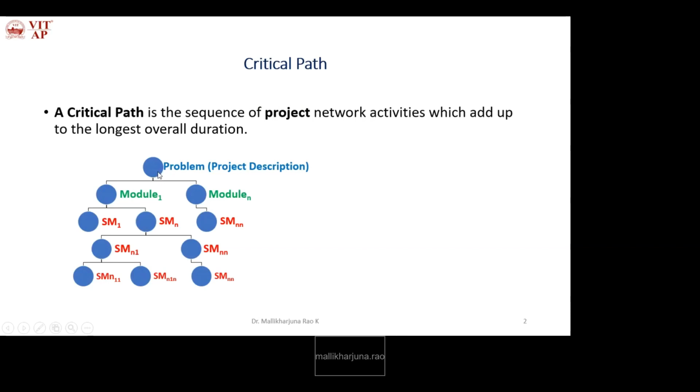This problem is divided into various modules. So here the problem, that is the project, is not implemented as a single entity. It is divided into various modules, and each module is further divided into submodules. Each submodule is further divided into sub-submodules, and so on until finding the lower level elements, so called objects.